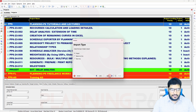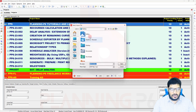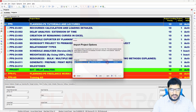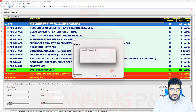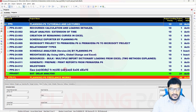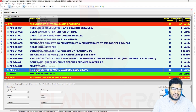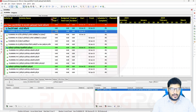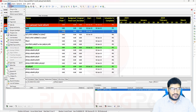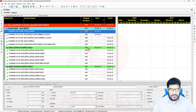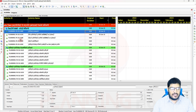I have the XER file. I will go to the desktop, select the schedule file, click Next, and create a new project under Enterprise. Select the calendar if needed and click OK. Now you can see that the language is not displaying — even though the schedule was in Arabic, the text is not visible. Looking at the activities, only the Activity IDs are in English; the activity descriptions and names are not showing, nor is the WBS. So how do we resolve this?